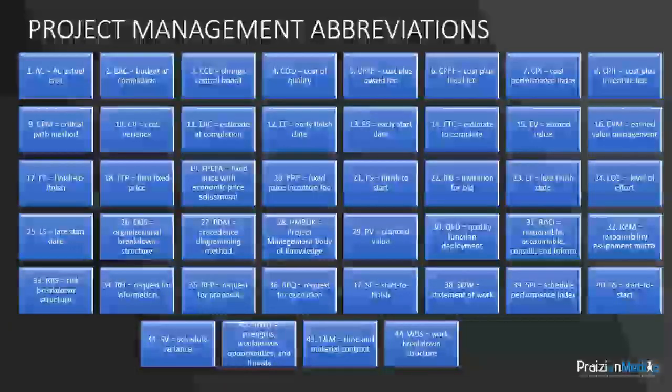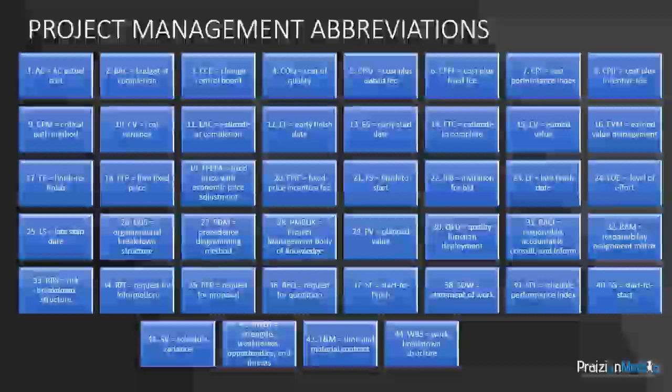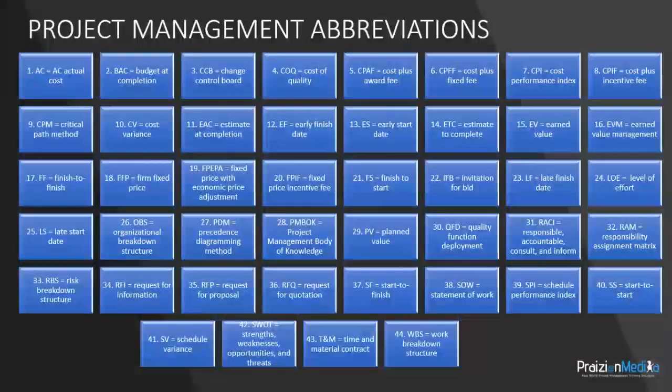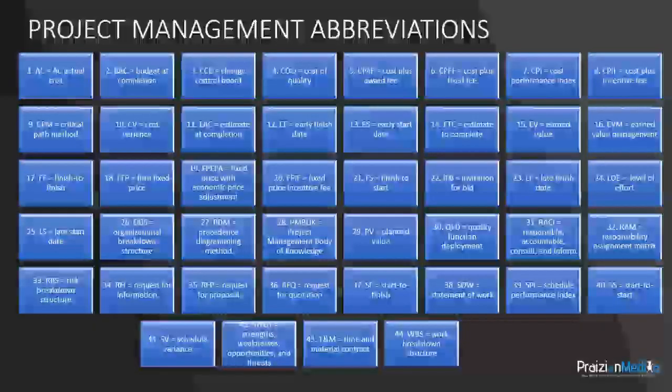For a long time, people have incorrectly referred to the WBS as a list of tasks, but it is not a list of tasks. It is a higher level aggregate of these tasks. The WBS aggregates tasks at its lowest level, known as the work package level. So think about the WBS as a hierarchical breakdown of work that needs to be done either by deliverable components or by phase or some other breakdown.